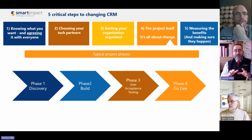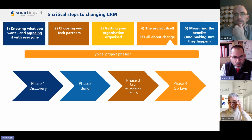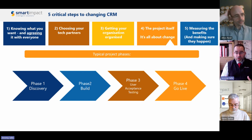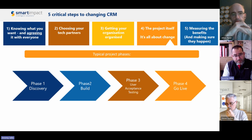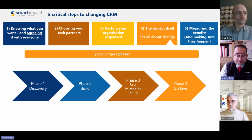So this is where you are effectively testing the system and ensuring that it is ready to be deployed and to go live. And I'm going to go a little bit warts and all here in my description of UAT, because I can't stress enough 2 things about UAT. Number 1, it's the most important phase of the project because it is the business end of the engagement, and it's when the work that you've been doing throughout the project is crystallized, signed off, and made ready for go live. But number 2, unfortunately, testing will probably take longer than you imagine, and it's highly likely that it will be difficult to get people to want to do it for as long as it needs to be effective.